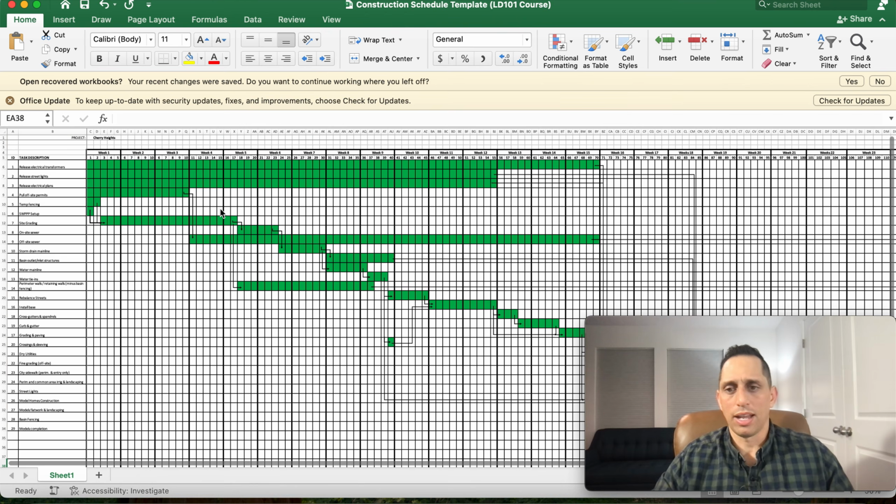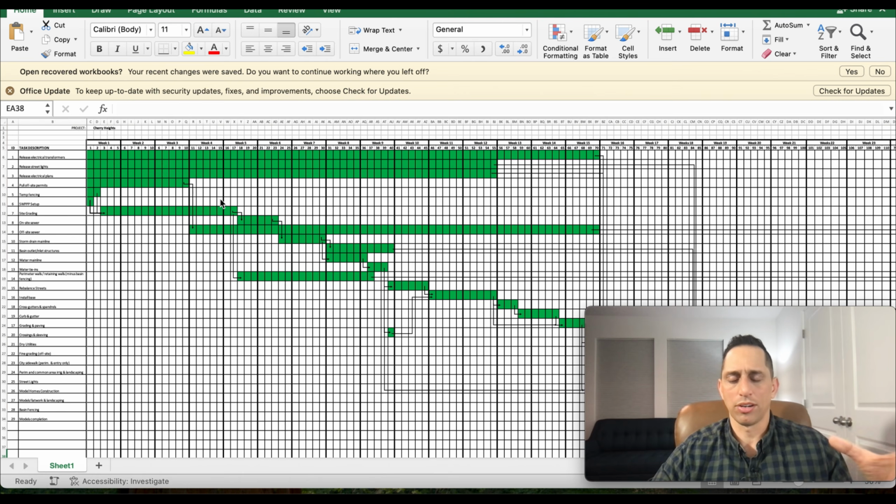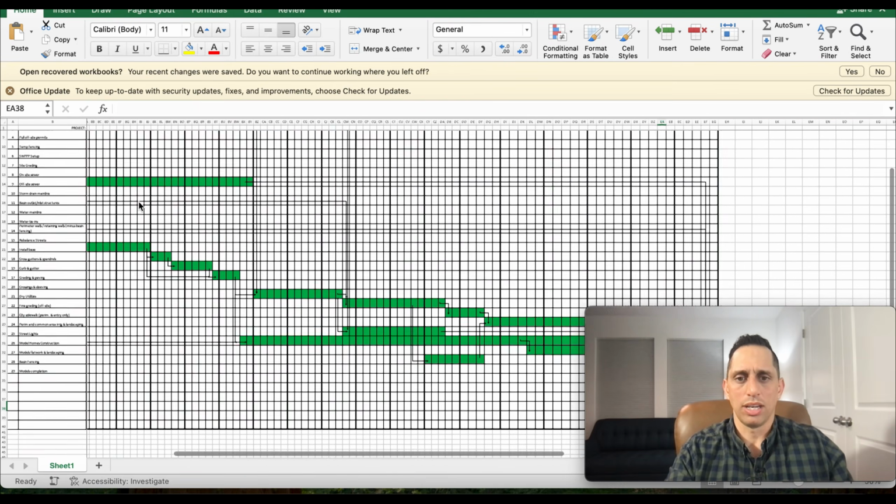Now, typically for the land development, for the trades, which are rough grading, wet utilities, paving, dry utilities, right? Everything underground up to the paving. Now, typically that happens in a linear fashion. There could be some overlap there, but usually that's pretty cut and dry as far as boom, boom, boom. One's done, go to the wet utilities, then paving, and then dry utilities. But it's the dry utilities, I'm sorry, the